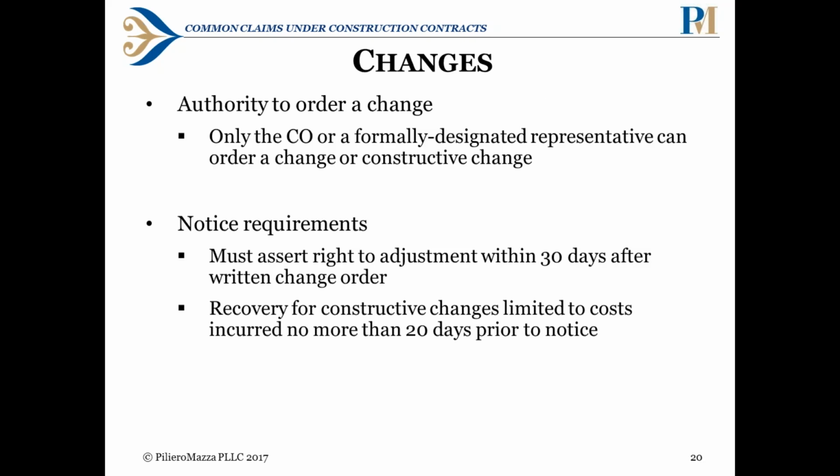For changes, it's important to recognize who has authority to order a change. It can't just be made by any government personnel. It can only be made by the CO or a formally designated representative of the CO that can order the change or constructive change. So it's important for a contractor to pay attention to who's actually directing the work and